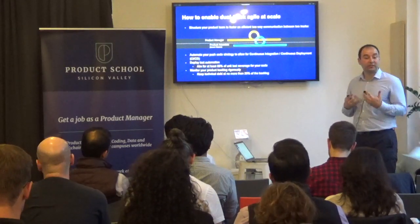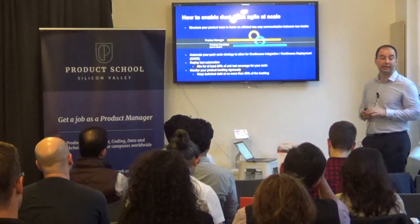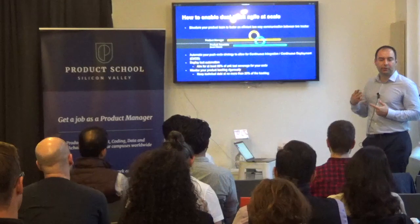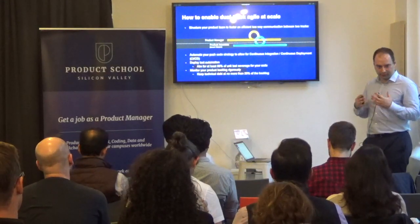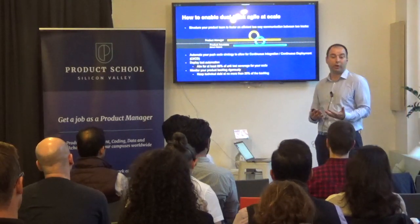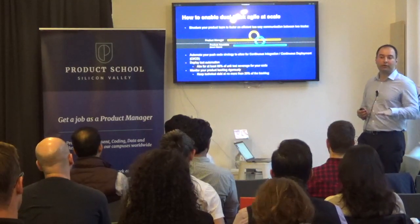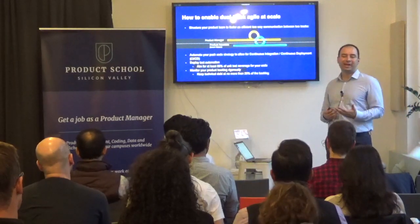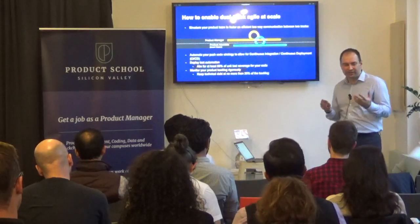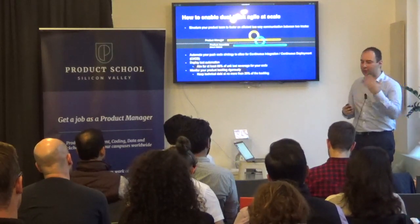But when you start actually coding, you need to make sure that at least 80% of your code base is covered by unit tests. This is critical about testing overall, because once you start deploying new code or new releases into the production environment, you're always going to start breaking other stuff. And in order for you to check what you broke, unit tests will help you in the process. 100% unit test coverage is a lot of work for the engineer. This impacts the product delivery timeline overall, because it's kind of one-to-one based on the engineering practices. So if you put a sprint for coding, you need another sprint just to write unit tests for 100% coverage usually.